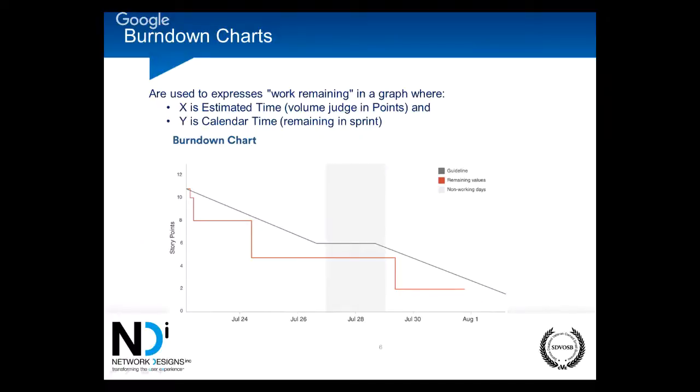In that sprint closing meeting, you're talking about the various types of tasks. You're evaluating the estimates on those tasks, on the issues that were actually created in Jira. You're looking at your accuracy in the evaluations. You're trying to make sure that you accurately estimated, that you accurately tracked your work, and that you accurately tracked your team's velocity. And as an individual, I would always be concerned about accurately tracking my individual velocity so that I can estimate properly when the time comes.